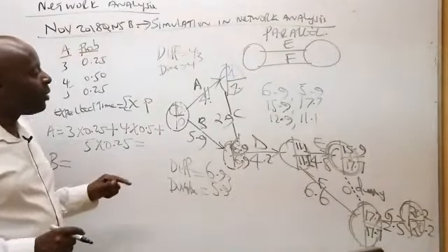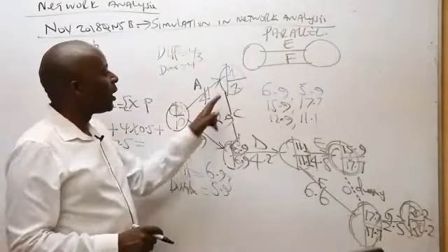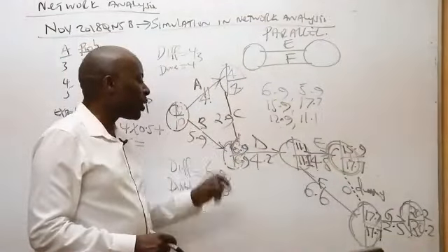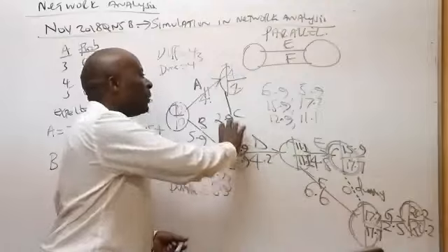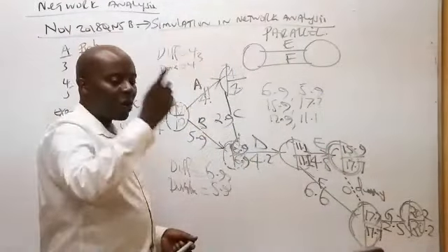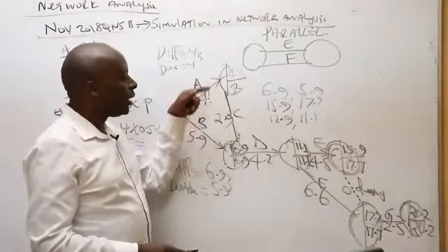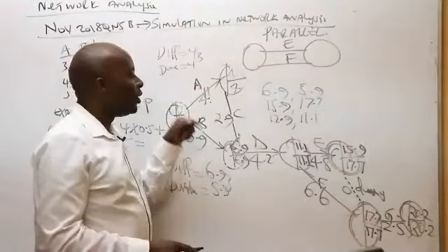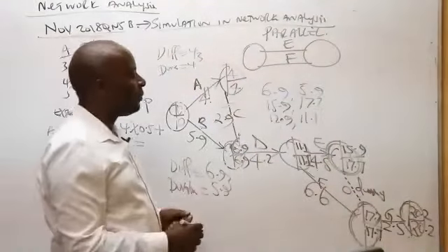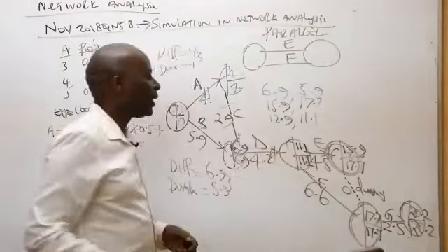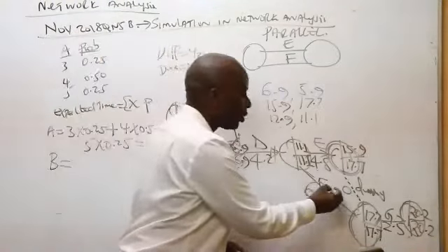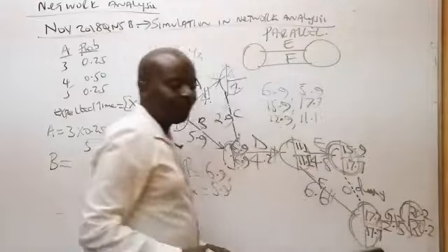Critical, ladies and gentlemen, we must always see a situation where the tail timings are the same, then the head timings also coincide. And then when you take the head minus the tail, this 6.9 minus 4, it gives me 2.9. There is a coincidence that that difference is exactly equal to the duration of C. So C automatically is critical. And of course, I can bear witness with you that D is also critical. So F will be critical, G will be critical.